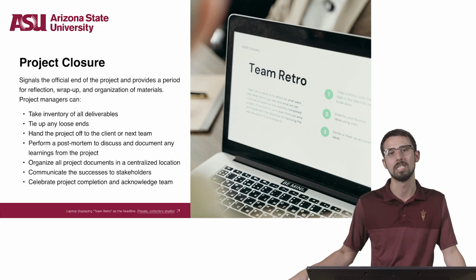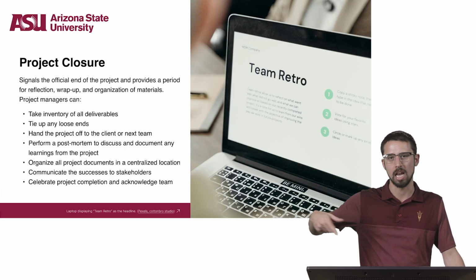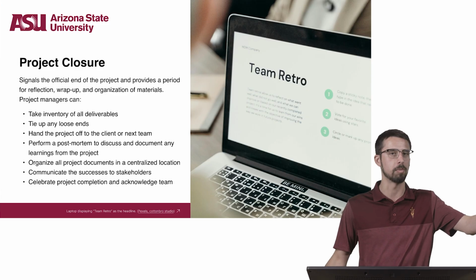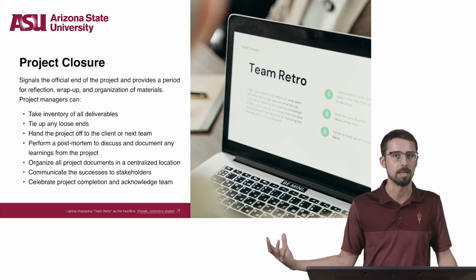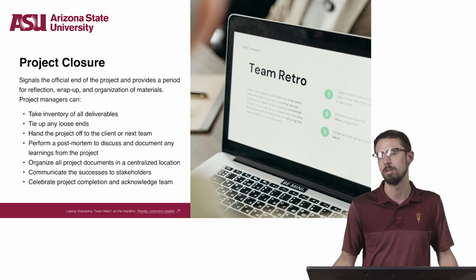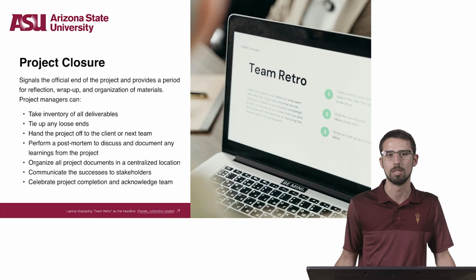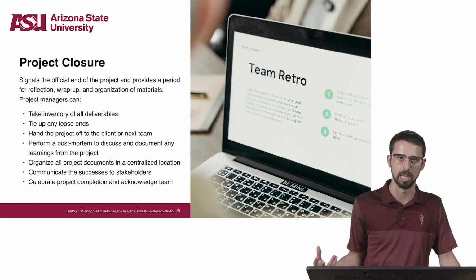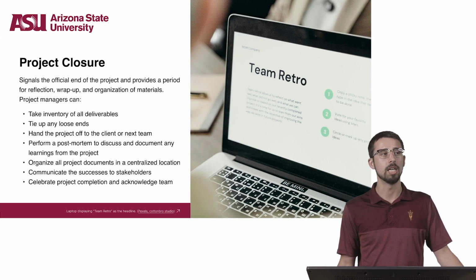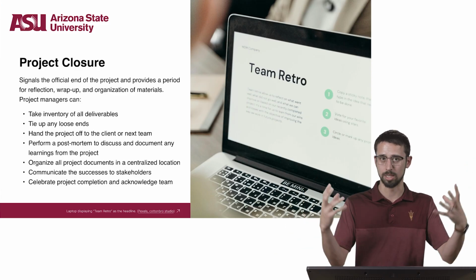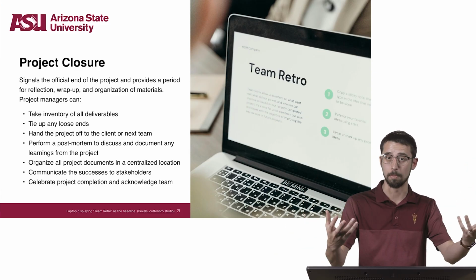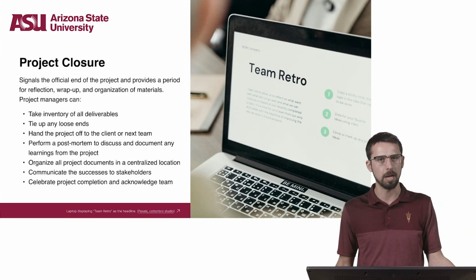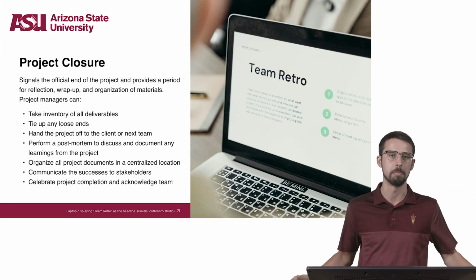And project managers can take inventory of all of those deliverables, tie up any loose ends, hand the project off to the client or the team that will be managing the project's day-to-day operations from this point forward, and then also perform something that's called a post-mortem. Sometimes you might also hear those called retros, which is short for retrospective. And these are really just to discuss and document any learnings from the project. You can also organize all project documents in a more centralized location. This is a great opportunity to communicate the success of the project to stakeholders and executives, and then celebrate the completion of the project and acknowledge the team members that worked on it.